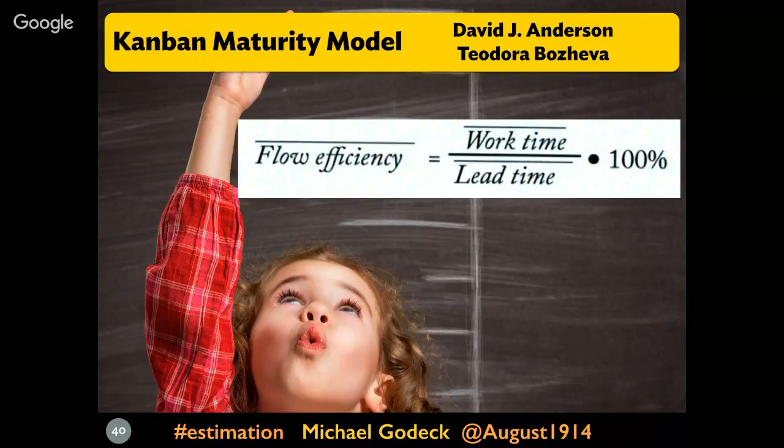Now, Kanban offers a much simpler approach, which effectively is mean cycle time. So it's the same principle, but now instead of doing it across iterations, you're just doing it across stories. As long as there's some reasonable effort made in story decomposition, preventing epics from going into work, right? If you put stuff into work in Kanban, since you don't have a time box, and it runs 2 weeks, and then you find out that you're only getting started, then you're not going to have a very good time using that in any kind of math, right? And you're trying to avoid that kind of thing anyway. Getting to no estimation in Kanban relies on the same principles of having some stability of throughput, right? Stability of throughput is really the basis of reducing the amount of estimation that you can get away with.